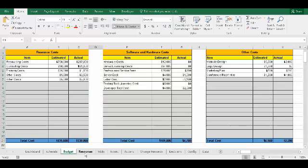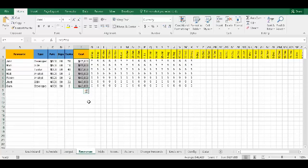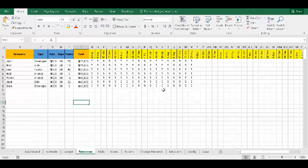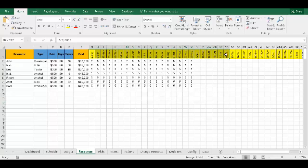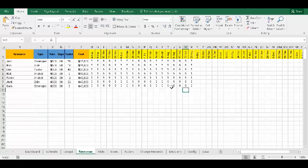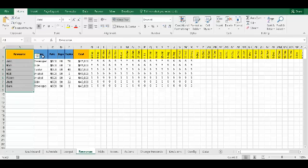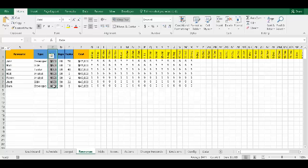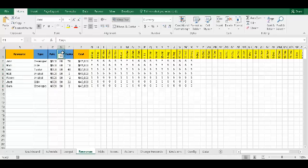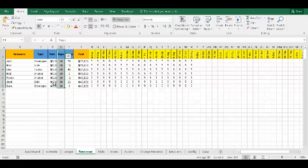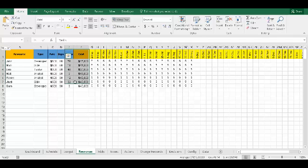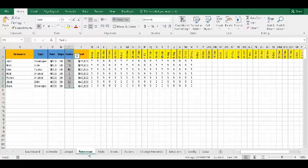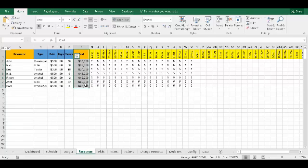This is the timeline, resource name, the type of resource, what the daily rate is, and how much allocation you have. And this field test comes from the schedule that you have. And then of course the cost is calculated based on the number of days and the rate. There are two things to project resource management. One is you do resource allocation, and then you do your schedule. So you do your allocation and you say, I want this person from this date to this date. And then you have to make sure as a project manager that you are allocating enough tasks to them.